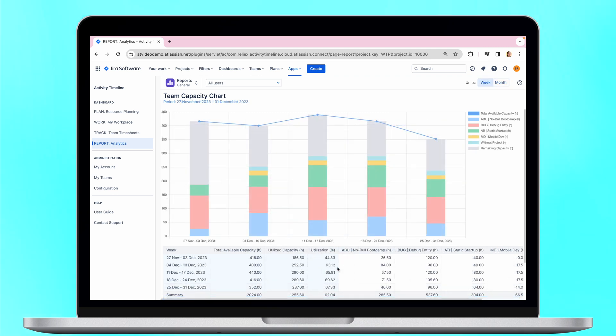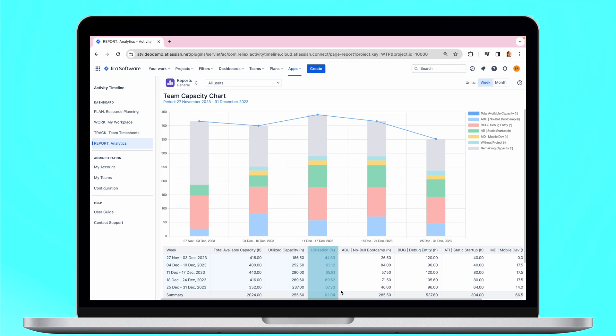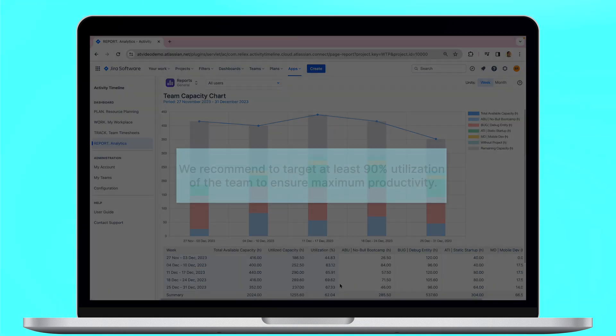Now let's understand how can you use this report. For example, here we can see that for the month of December, we only utilized around 60% of the team's capacity, meaning that we still have almost 40% of the underutilized capacity. So this team is available for additional work.